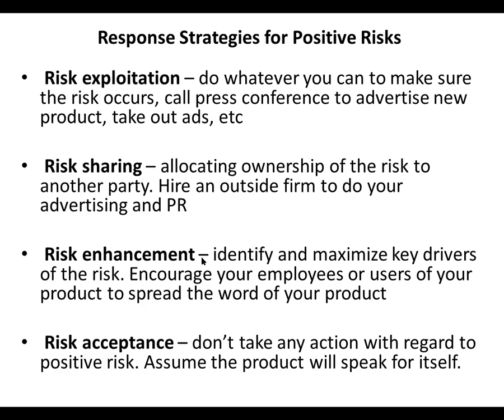Risk enhancement is where we identify and maximize key drivers of the risk. We encourage your employees or users of your product to spread the word about your product. That is called risk enhancement. And risk acceptance means don't take any action with regard to the positive risk. We assume the product will speak for itself. You do something and let it be there, and it would stand on its own. So these are the four main strategies for positive risks.